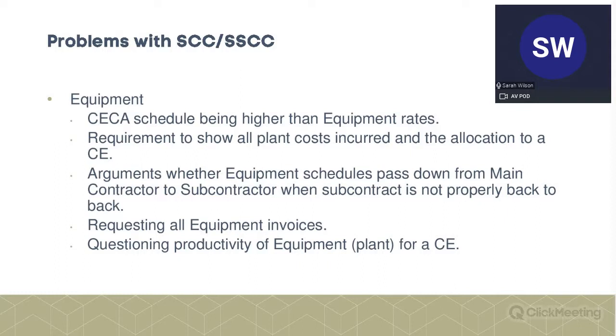And again, similar costs to the people, probably less sensitivity, but the requirement to show, right, we had this particular crane and this is the particular cost of that crane, and this was how long it spent engaged on that particular compensation event.